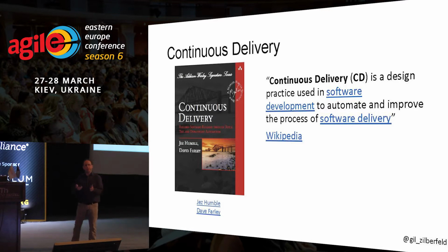So we were able to deliver more quickly than they could actually pull, which at times confused them and made them very angry. So when you have the ability, with great power comes great responsibility, as we all know. Think about how you fit into that process. Going after delivery like Amazon, every 8 seconds, may not be suitable for your process.